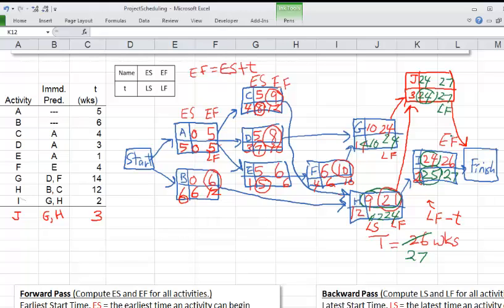So here the important thing to remember is that if you have more than one final activity, just remember to choose the total time is going to be the highest LF of the final activities. And that's the number that you will start the backward pass with. This is the number we would put in the bottom of all the final activities in order to start the backward pass.